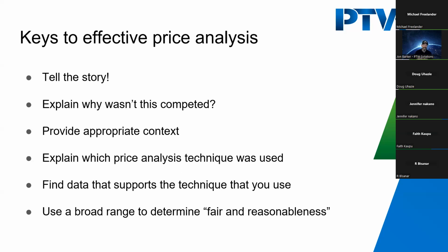Because a lot of ones I did maybe 15 years ago, we had a little checkbox. It was customer directed. And we learned that the auditors didn't think that was very acceptable. So we conditioned our project folks, project managers, operators, to get the why behind that, right? So it was customer directed, why? Oh, well, they were on the legacy program, or oh, they're the OEM, right? Or they're the ones that originally did the install. So just try to get that extra layer when somebody's asking you, we need to go with this subcontractor, get that reason why and use it in your narrative, right?